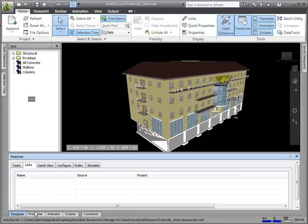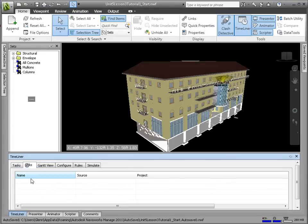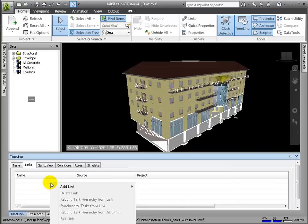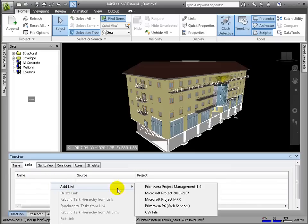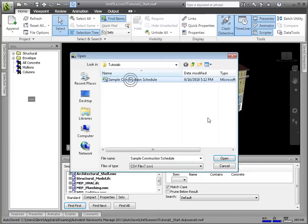We'll open Timeliner module and go to the Links tab. Right-click under the Name column and choose Add Link. Here we get an idea of the file formats that Navisworks supports, such as Microsoft Project, Primavera, and of course CSV. Let's select CSV.